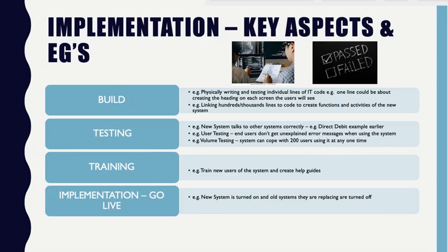This conversion process should have minimal disturbance on the company itself, and it's usually done over a weekend or during a holiday period. The teams involved during the conversion process include operations, technical architecture, conversion development, business users, and the project manager themselves will be on hand throughout.